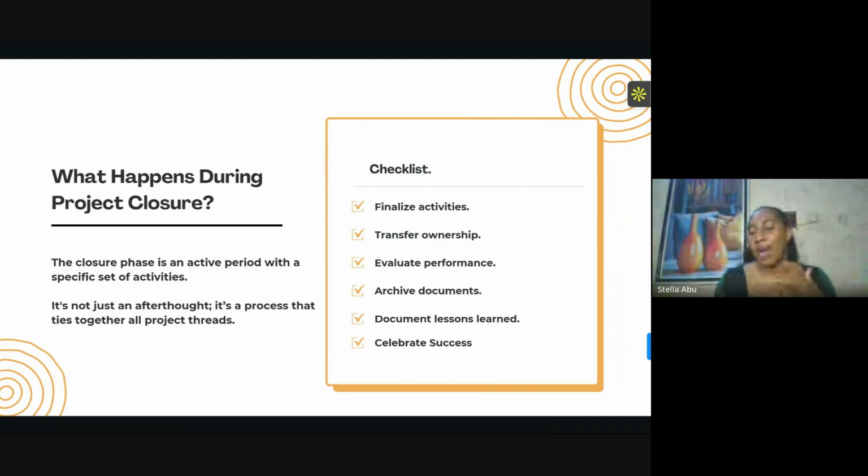Please look at it if it has the same thing. Now, basically what you are doing is transferring your deliverables, but also showing that this is what I did based on the scope. And I'm transferring it to you, the customer. Look at it, evaluate it. Or I'm saying, operations team, product team are done with whatever you asked us to do. This is the project. You can test it and see if it works.